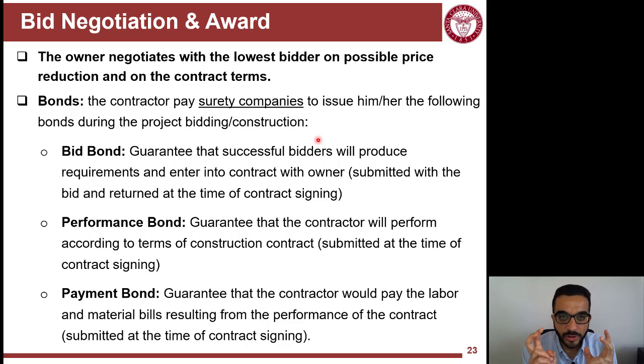So they will be a kind of co-owner of the property, and they come from nowhere. The owner didn't expect that because the law allows them to do that. So if they don't get paid for a project, they have the right to put a lien on the property, so the owner cannot really be a sole owner or a true owner of this property.